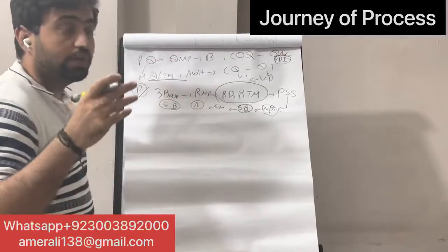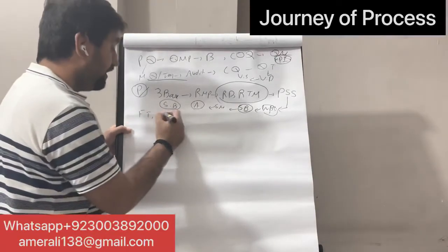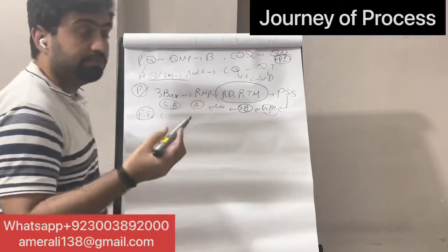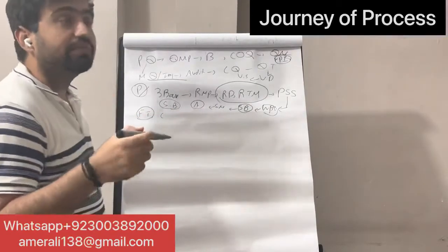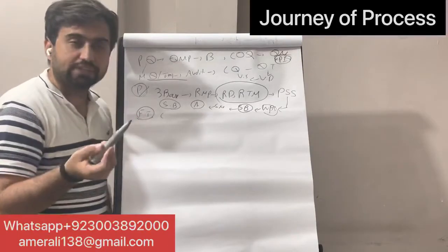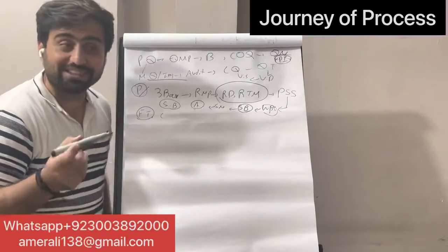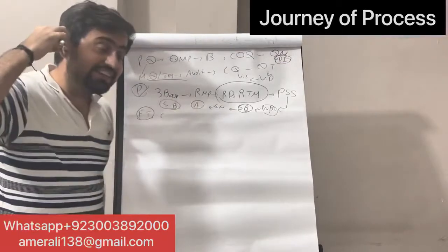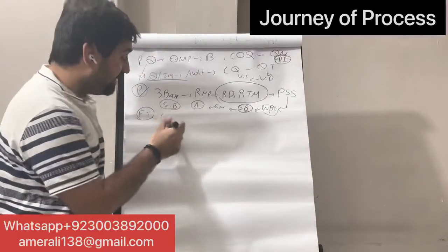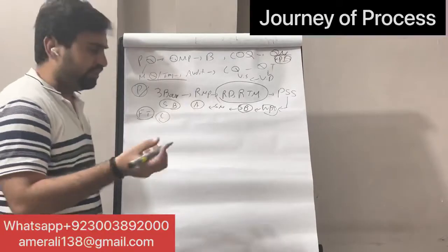We get a critical path that becomes the schedule baseline. If you want to compress your schedule, we have two techniques: fast tracking and crashing. Fast tracking is making activities run in parallel, and crashing is adding more resources. The negative effect of fast tracking is that there is a risk of rework. I am summarizing the entire thing, so I am mixing a few things. The same thing happens with crashing: you add resources, and there is a chance of rework.